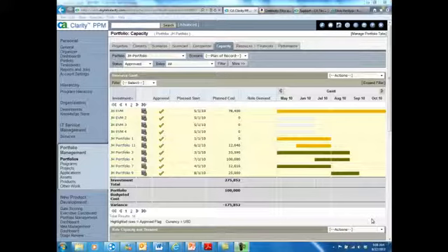The first tab is the Resource Gantt, which shows you the key information associated with the project and the time frame when the roles are going to be utilized and the demand for the role. The Resource Capacity Supply and Demand portlet enables you to look at each of the roles associated with the projects in the portfolio and to compare the capacity for those roles with the demand for effort for that role in the portfolio.